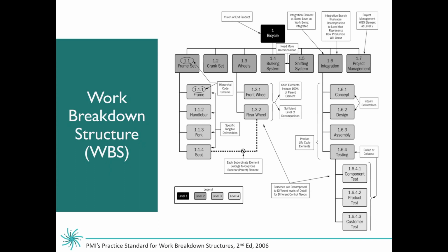You also want to break each of those down, and you can see that the frame set is broken down into smaller pieces. So 1.1.1, 1.1.2. You want to continue to break these down until you are able to accurately estimate cost, durations, and assign resources.